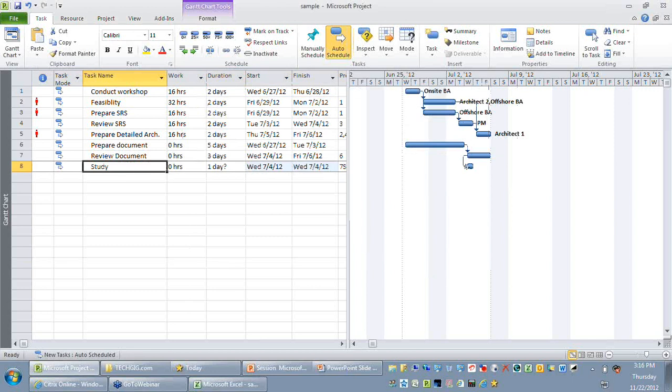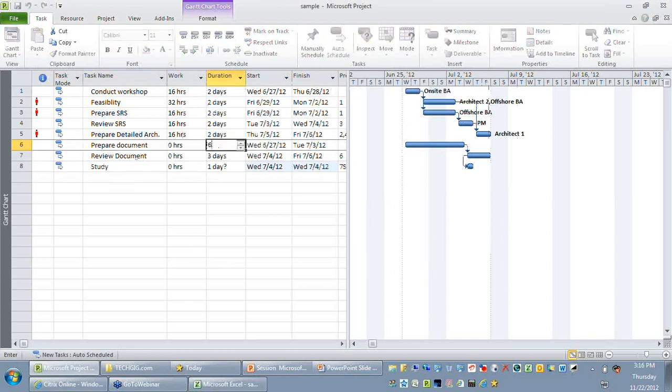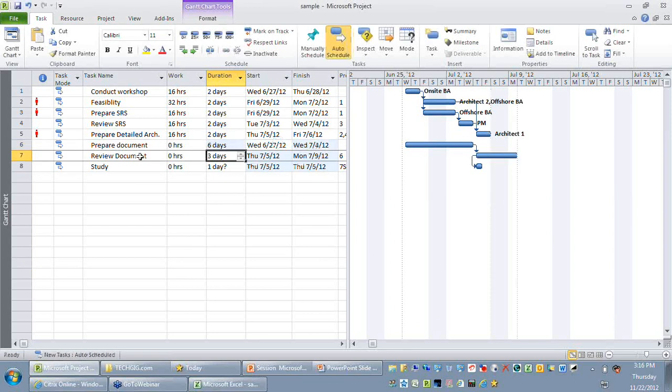The benefit is that tomorrow if my prepare document duration is revised from 5 days to 6 days, you can see both my review and study will get automatically pushed. So I hope this is the question we had. Okay, thank you.